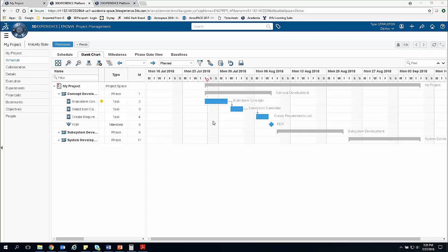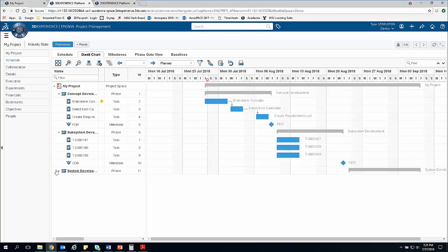You may also have noticed that the duration and the timeline of the phases line up in a weird way for the same reason. Even though the deadline of concept development is placed 2 weeks after the start date, it's still marking the duration as only 9 days because it's skipping over the weekends. Alright, so let's move on. Let's look at some of these other ones.